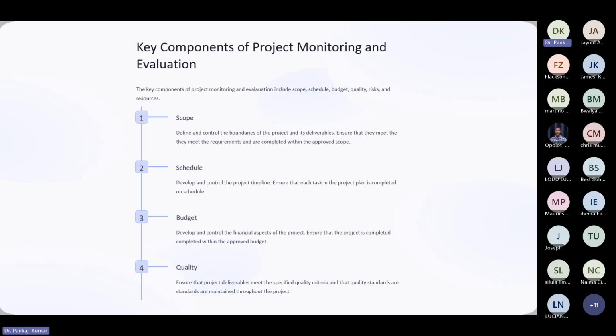We can allocate budgeted amounts to individual project tasks and activities. We can ensure that resources are appropriately assigned to each task. Once the project budget is finalized and approved, we can establish it as the baseline budget. This serves as the reference point against which actual expenses are measured.